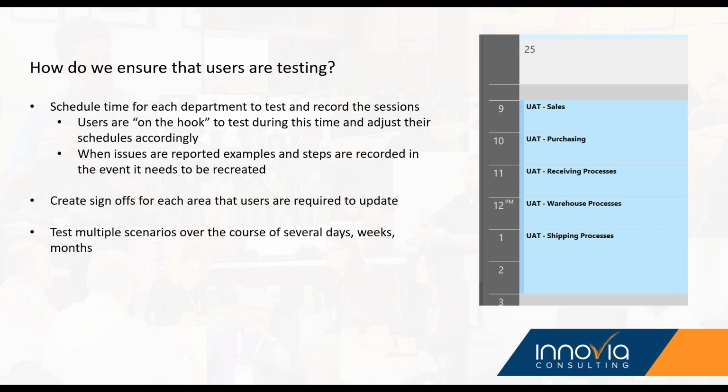But if we can get them in there, if you can say to my sales team, you need to enter orders once a week. We're on this upgrade from a 2015 database to a Business Central SaaS. We have a few ISVs that don't really touch our sales team, but we need you to keep entering orders because something's going to come up. And it may not come up initially when they're entering their sales orders. But if we don't have sales orders, my warehouse cannot ship and they cannot receive. So we have to just keep pushing.